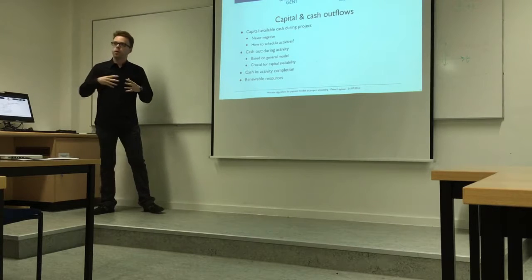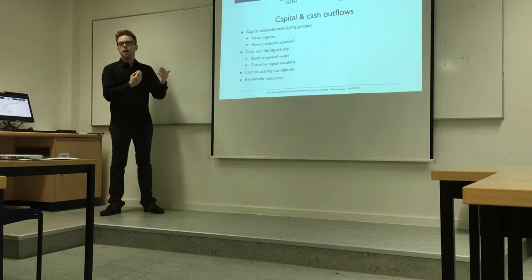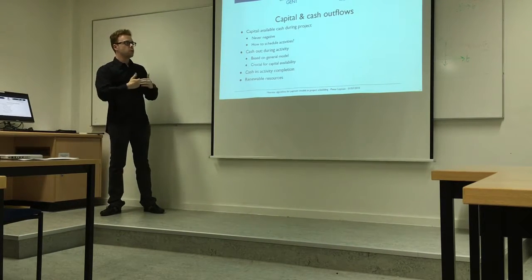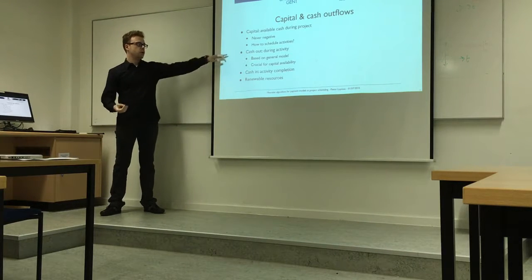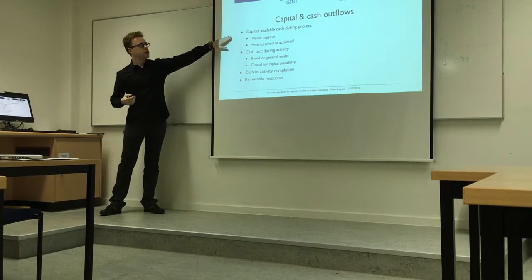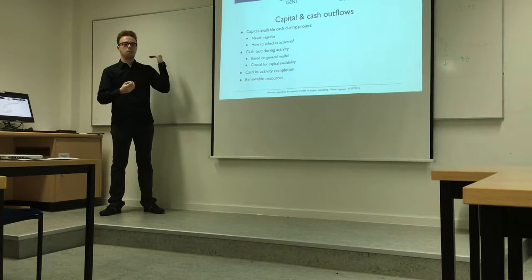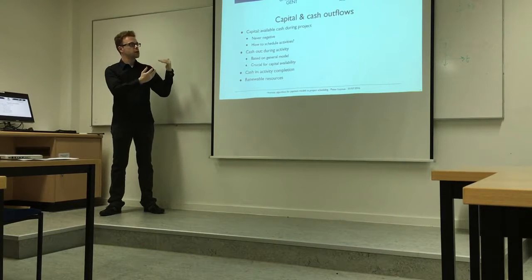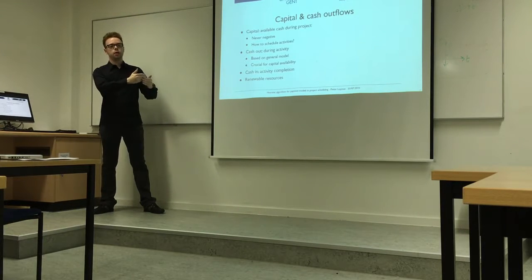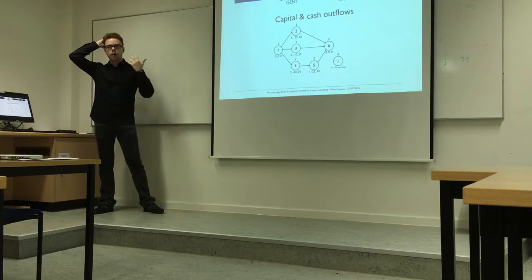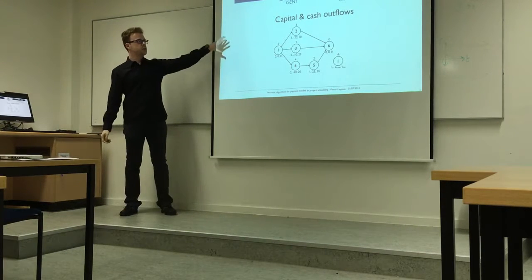The next chapter takes a step back from timing and size of cash inflows — assuming they occur at each activity's finish time — and focuses on how cash outflows are managed and the impact of including capital availability. For example, a project starts with 100,000 euros of capital; this decreases based on cash outflows and increases based on cash inflows, with a typical time lag between outflows and inflows based on activity durations.